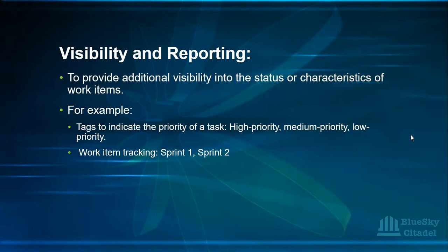You might even want to track work items by sprints. So we all work in sprints, and I know we've been working in 2 week sprints. So you might add a tag to each of the work items, for example, sprint one, sprint two. And what is really nice about that, it allows you to generate sprint specific reports.